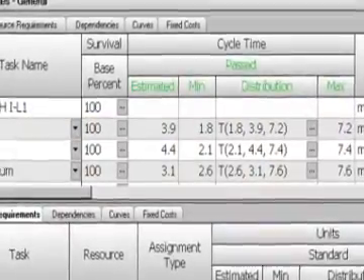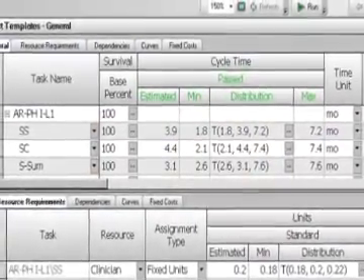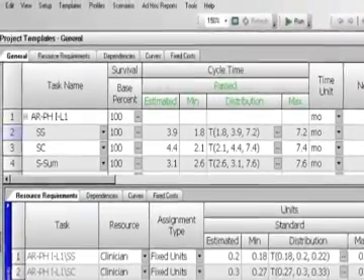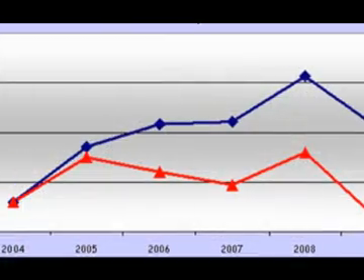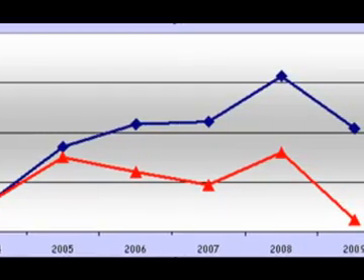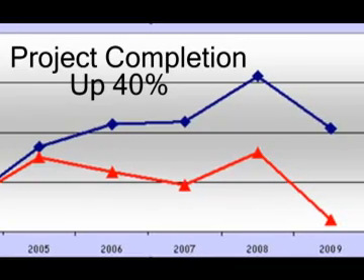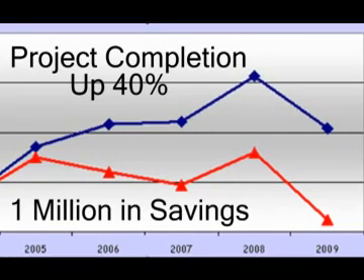Retailer Hot Topic successfully employed Portfolio Simulator coupled with Microsoft Project and Project Server to dramatically improve their IT project selection, portfolio planning, and project delivery. This combined solution has improved their on-time project completion performance from 50% to over 90% while making resourcing decisions that have saved more than $1 million annually.